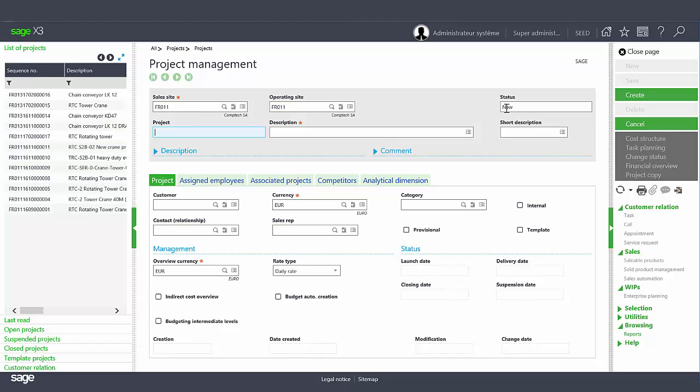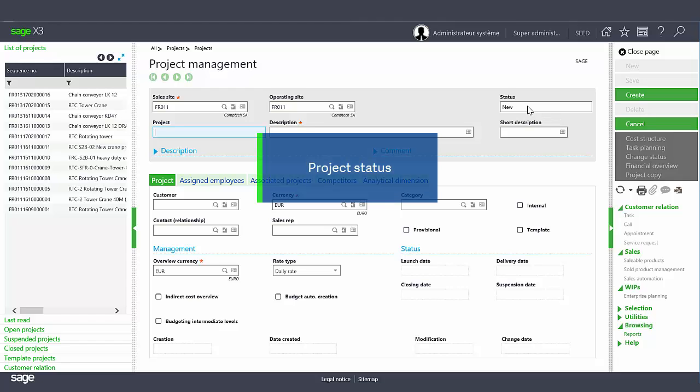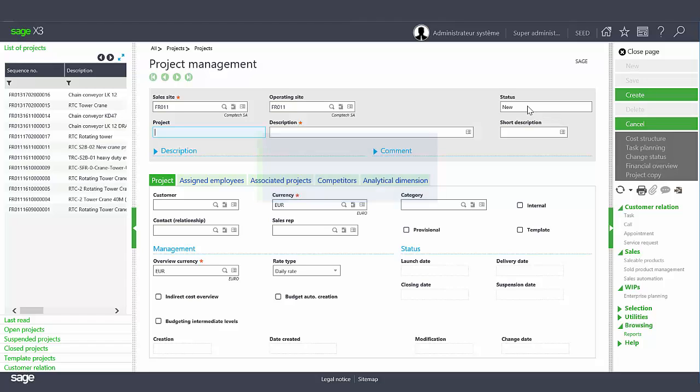A project can have different statuses. Initially, a project is created as new, and then the project can be changed to launched, delivered, suspended, and closed. Statuses are also managed on the budget level and in task planning.